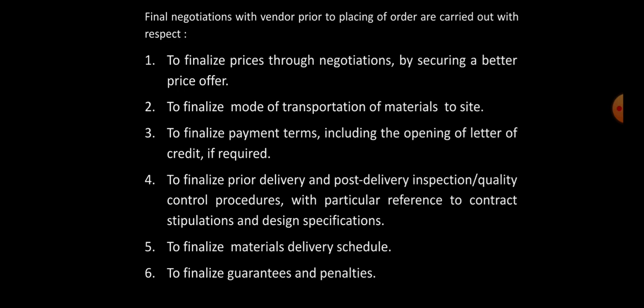Before closing the final negotiations, a recheck is done to ensure that the necessary documents needed for manufacturing and making supplies as per contract have been provided to the vendor by the contractor.